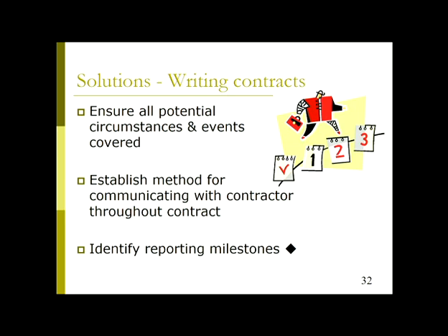And so these milestones are the sorts of things that are used for reporting on progress, so keeping track of time, and also tying payment to. So a project should have reached a certain stage in a certain amount of time. When that stage is reached, then part payment will be given.